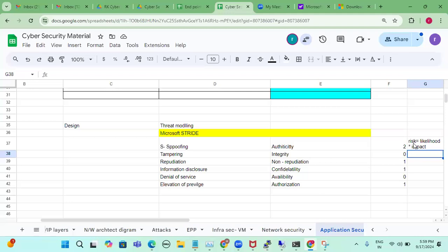Whatever risk is identified, we ask whether they will accept the risk, mitigate the risk, transfer the risk, or avoid the risk. We have to ask all these questions, and in case they accept, when are they going to fix this? If they accept changing in this release itself, it's well and good for us.